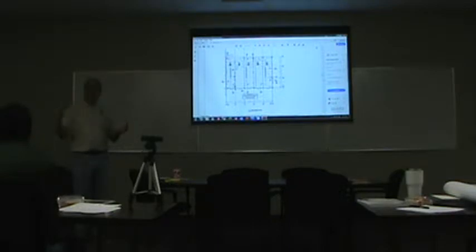Okay? Theater construction, when you're inside of a theater, you lay out from the back wall toward the screen, right? Okay, not from the screen back. Dimensions could be wrong. You have to know where to run your dimensions wild. I call them wild dimensions. You always have play in a building, okay? We can generally build a building within an eighth or a quarter of an inch, but invariably you need to know where to lose or gain, okay? What fractions you have. Am I making sense here? So this particular building, this shop, you're going to lay the shop out from back to front.